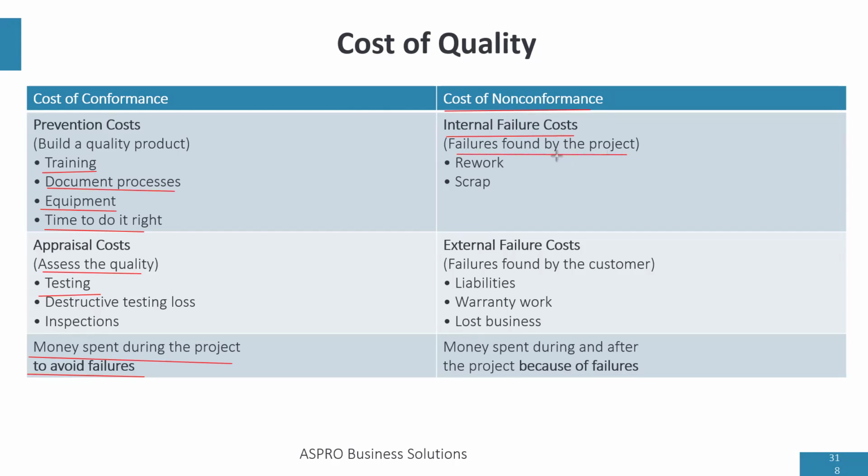And when you find defective products, maybe during inspection, there are two options. You either scrap it or we repair it. We scrap when the cost of repair is greater than building a new one. You can turn that product into a scrap.